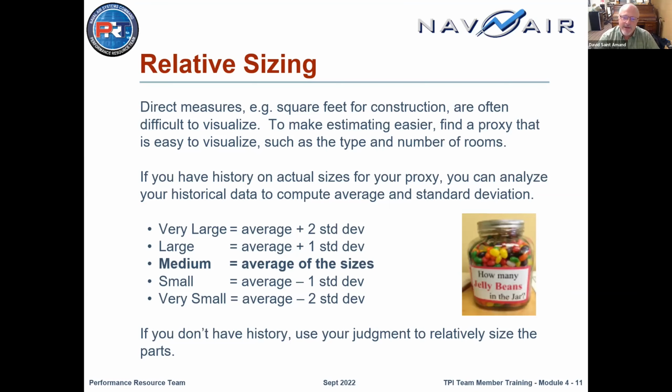When you collect all that data and you look at it, you find that Brad's typical job is going to be a medium, as almost as if his brain has been collecting data for all these years on ditch digging. And a large one is going to be one standard deviation greater. So that's lovely. Brad's estimate is probably going to be pretty good if he just looks at the yard and says, I've got to dig a bunch of ditches.